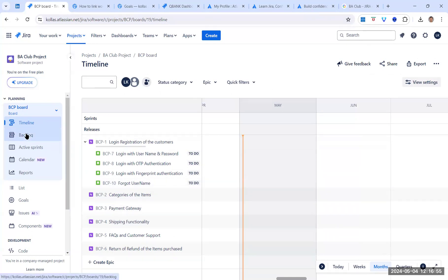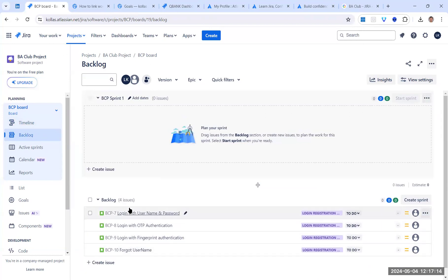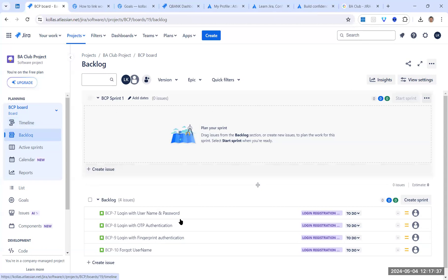In the backlog view, BCP-10 shows no purple epic linked, while BCP-7, 8, and 9 show their parent epic. Clicking 'Add Epic' on BCP-10 lets us select from recent epics to link it. Once linked, going back to the timeline will show BCP-10 connected under BCP-1 as parent. Epics are only displayed in the timeline screen or when linked as parent — they don't appear in any other screen within Jira.